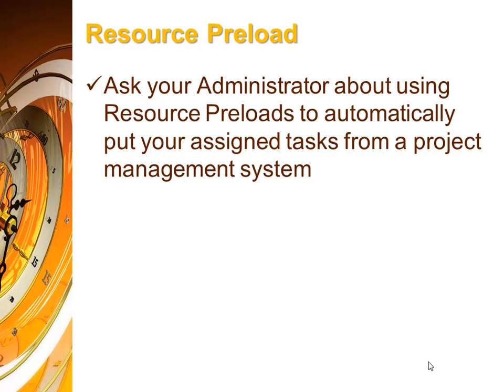If you're linked to a project management tool like Microsoft Project or Deltek's Open Plan or Primavera, then you can ask your Time Control administrator about resource preloads. Resource preloads come from your assignments in the project schedule and can also fill in your timesheet with information that you were expected to do this week.